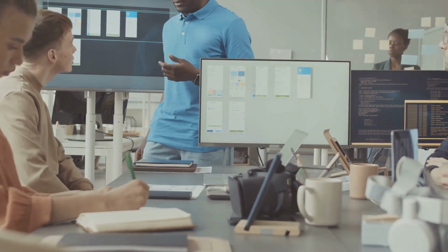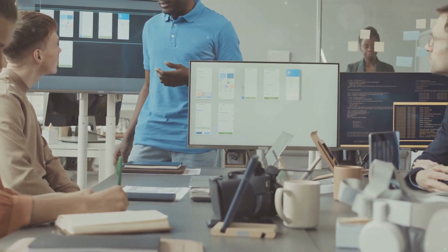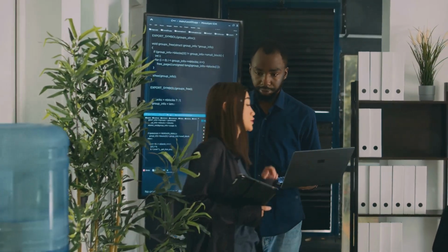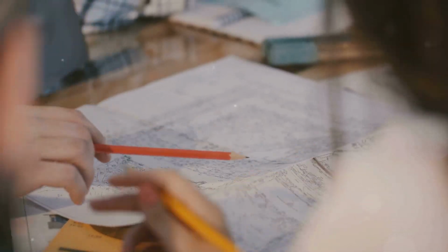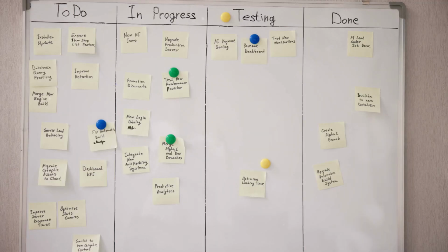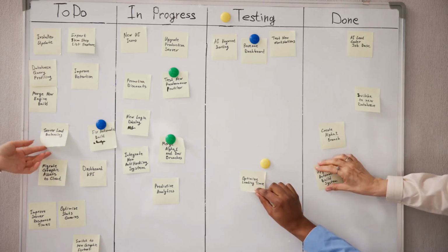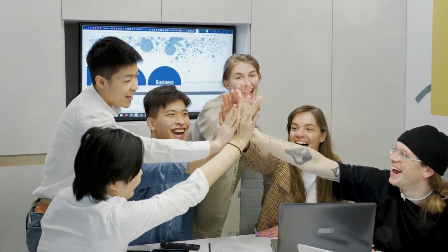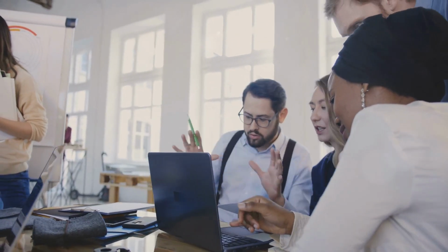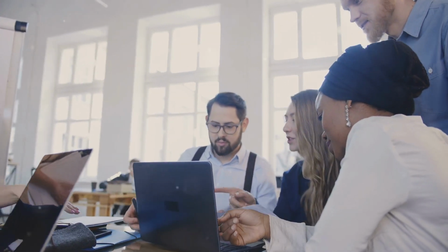For instance, consider a team that takes 6 weeks to deliver a feature, spending 1 week in planning, 2 weeks in backlog, 2 weeks in development and testing, and 1 week waiting for deployment. By introducing better backlog management, continuous deployment, and faster stakeholder feedback, they reduce this to just 2 weeks. This improved lead time means faster feedback, quicker value delivery, and happier users. It's a practical example of how optimizing lead time can directly benefit both teams and customers.